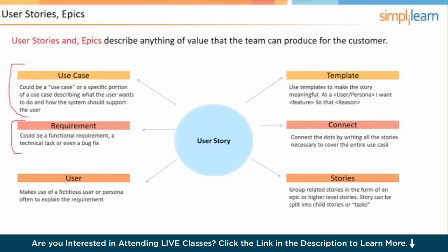Now, what could happen is that the product owner ranks these in priority. So this one first, then that one, then that one. And the team says, well, the only thing is that we have to do some development work before we can actually do user story 2. And so what we really need to do is insert that before the second priority user story.